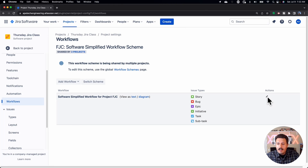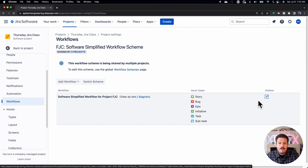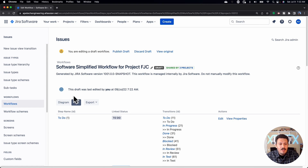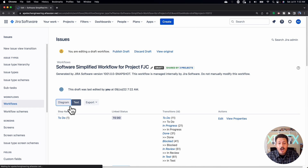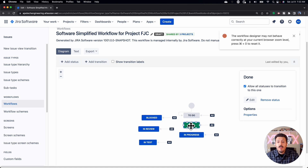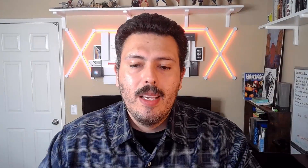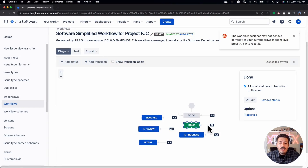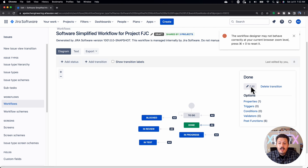Once I'm in Workflows, I'll click the edit button to edit this workflow. I don't like the default view — it confuses me — so I always switch to the diagram view because it's the easiest to read. What we're looking for on this screen is the status of Done. When I move something to done it automatically just goes to done, but I want something special to happen — I want to be given the option to pick the kind of resolution. To do that, click the little arrow on the right-hand side and click Edit.